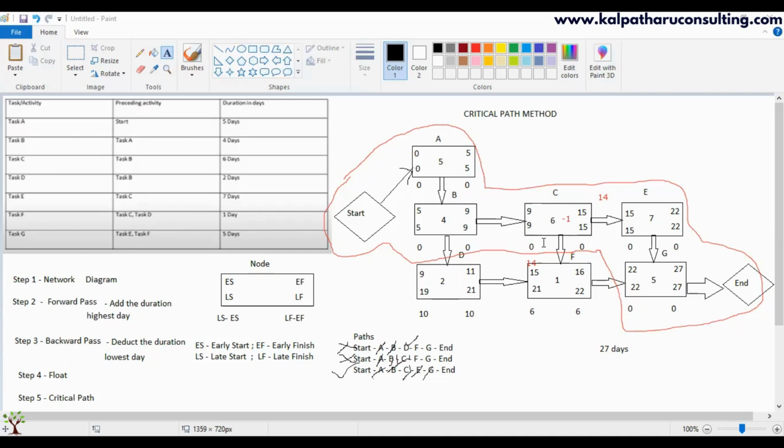So one learning is that the critical path helps us be conscious to ensure that we are not delaying. Another is that fast tracking, crashing, all this schedule compression is useful only when it is done in the critical path.